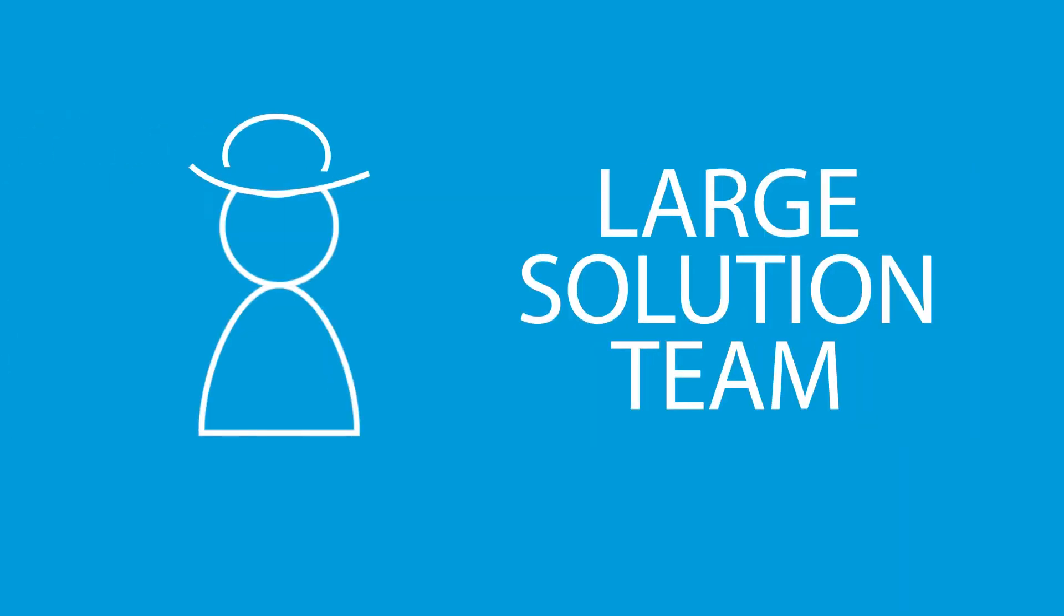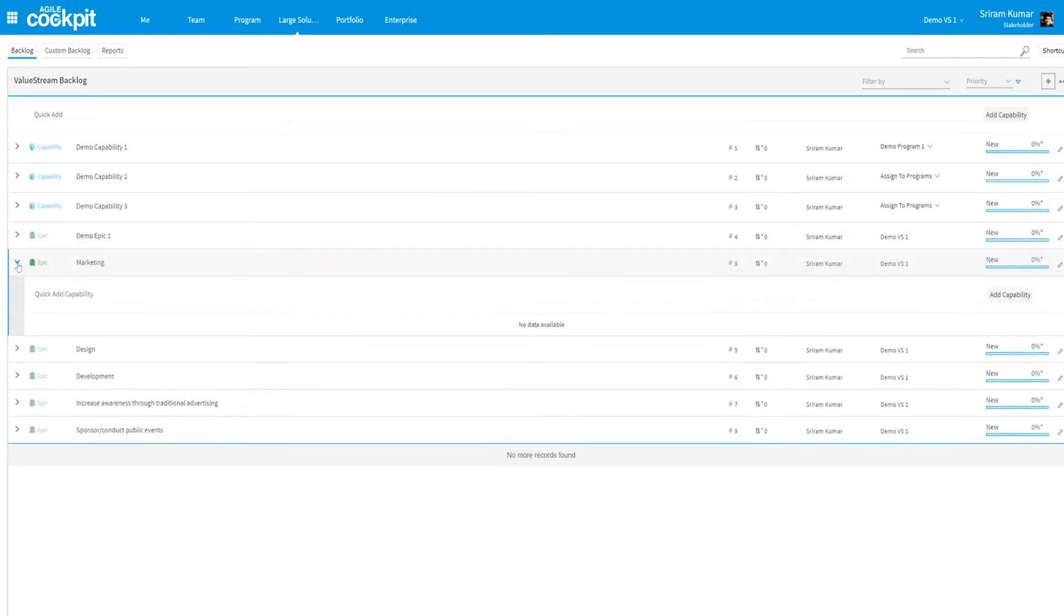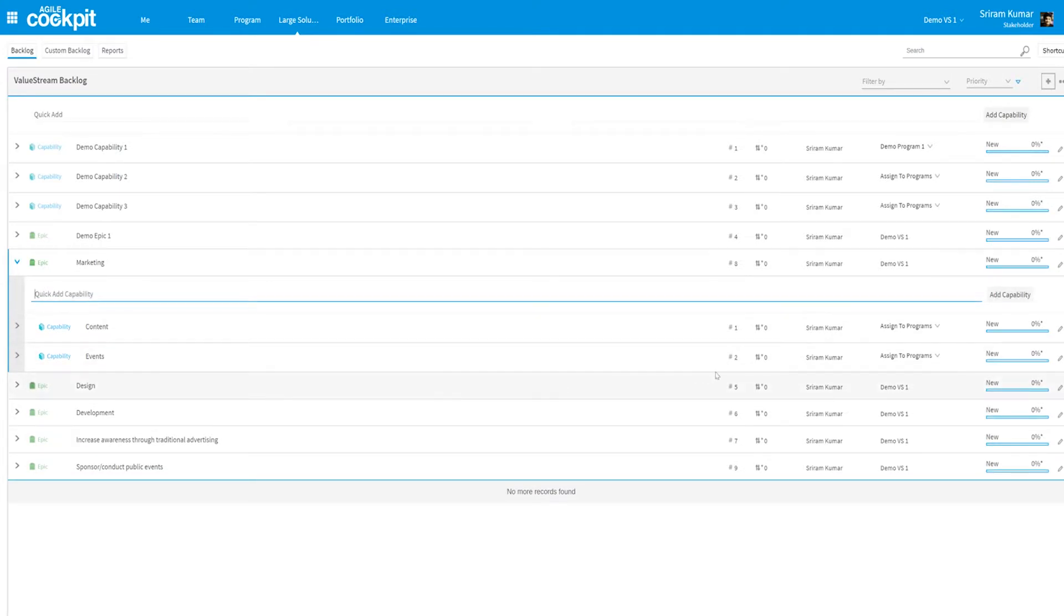Are you part of the large solution team? Then you can check the backlog and create capabilities under the assigned epic that came from the portfolio level.